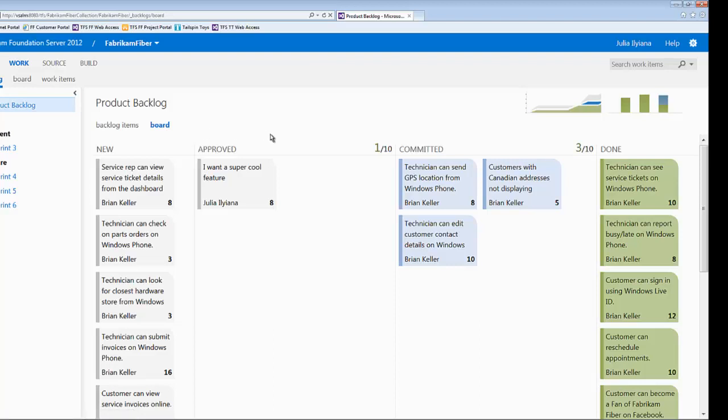One of the things that it shows in here, because you don't see them in the list, is that they're in boxes. You'll see who it is assigned to, and the number and the complexity of each user story. The nice thing about this view is you can tell who's free and who's working, who's overwhelmed with tasks. So for example, Brian here is really overwhelmed with tasks, so that could be a concern.